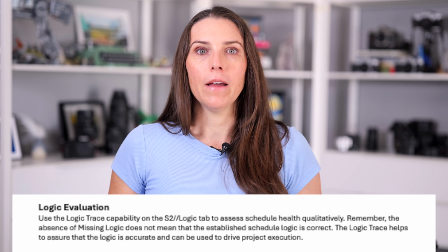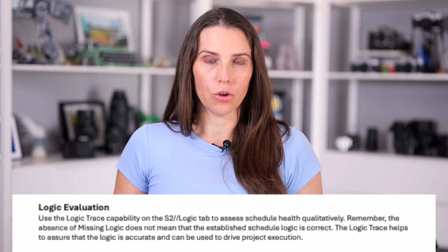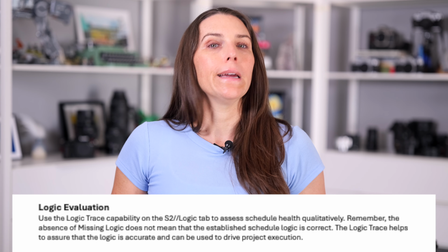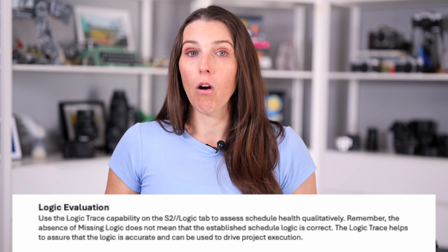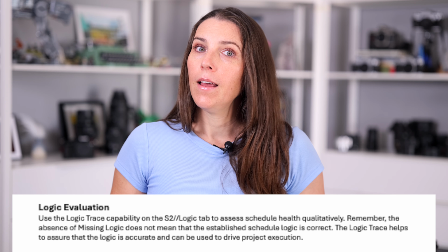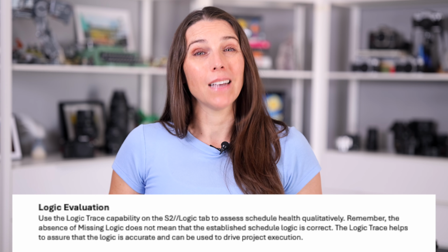Next is a very qualitative assessment. Critical path method schedules are, mathematically speaking, activities, links between activities, and durations of those activities. There's plenty more going on, but this is CPM scheduling at its core. What's make or break is whether the activities are all present and well-defined, and if the links between them make sense.